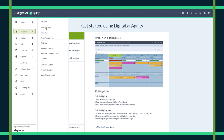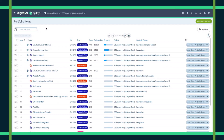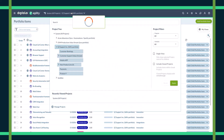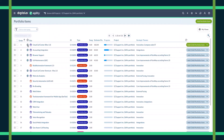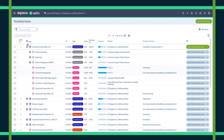Let's take a look at the portfolio tree, since it's really key to how the platform operates. This view enables us to view all the work in the platform, segmented by team or project. We're looking at various agile release trains or individual teams, with a roll-up of all the work to a particular level. What we're really doing here is connecting strategy to execution — I can see my portfolio epics and program epics broken down into features, and in some places even broken down into user stories and tasks. This gives us the flexibility to manage all of the work in our system from a single view, relevant to both portfolio users as well as individual team members.